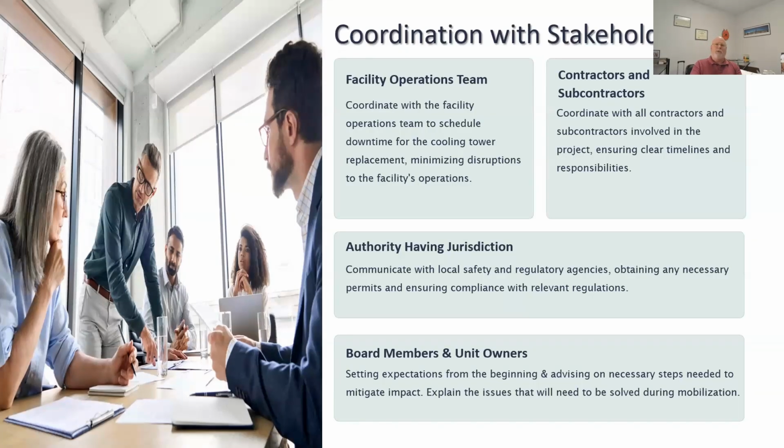But unit owners at some point will see, even from the simple standpoint of now we're done, now we got to start all the units up. And you will have to go to each individual unit at startup to help make sure that it starts up correctly and gets air out of the system and everything else. So again, a lot of coordination, a lot of people, a lot of moving wheels, a lot of planning that needs to take place.